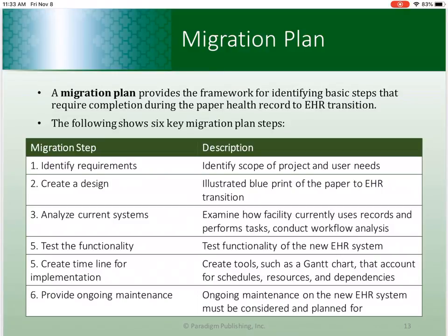So first, you need to identify requirements. So ask a facility to identify the scope of the project and user needs. Then you want to create a design. This provides a blueprint that illustrates the transition process from your paper health record to the new EHR system.